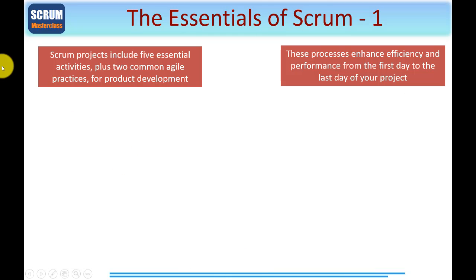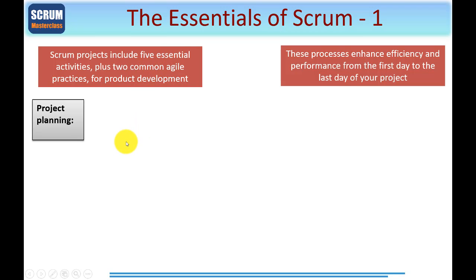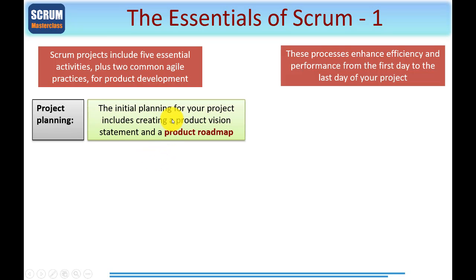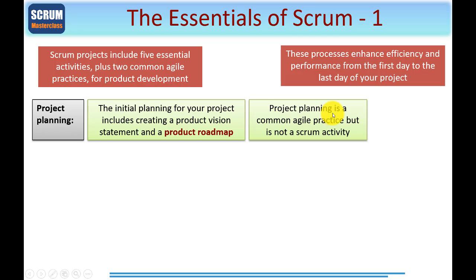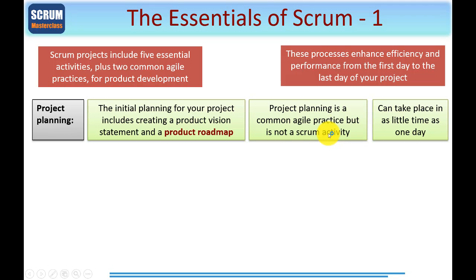Scrum projects include five essential activities plus two common Agile practices for product development. These processes enhance efficiency and performance from the first day to the last day of your project. Starting with project planning — this is the initial planning for your project, and that would include creating a product vision statement and a product roadmap. Project planning is a common Agile practice, but it is not part of the Scrum activity. This is one of the secrets to taking Scrum with a PRINCE2 wrapper and linking the two together.